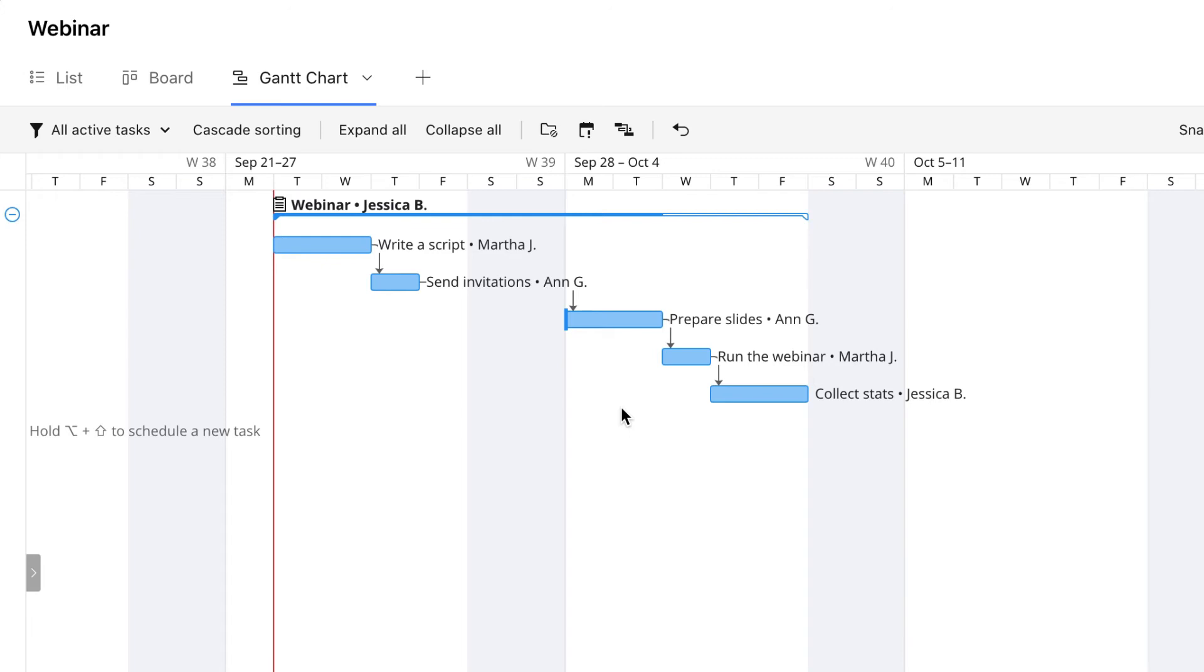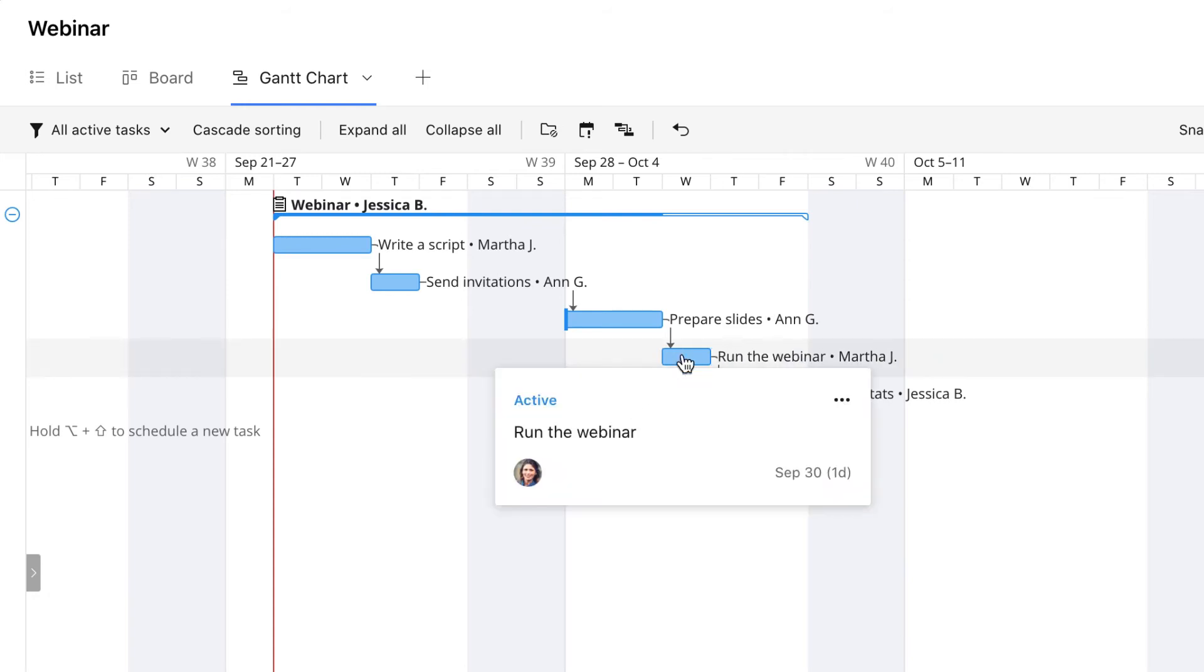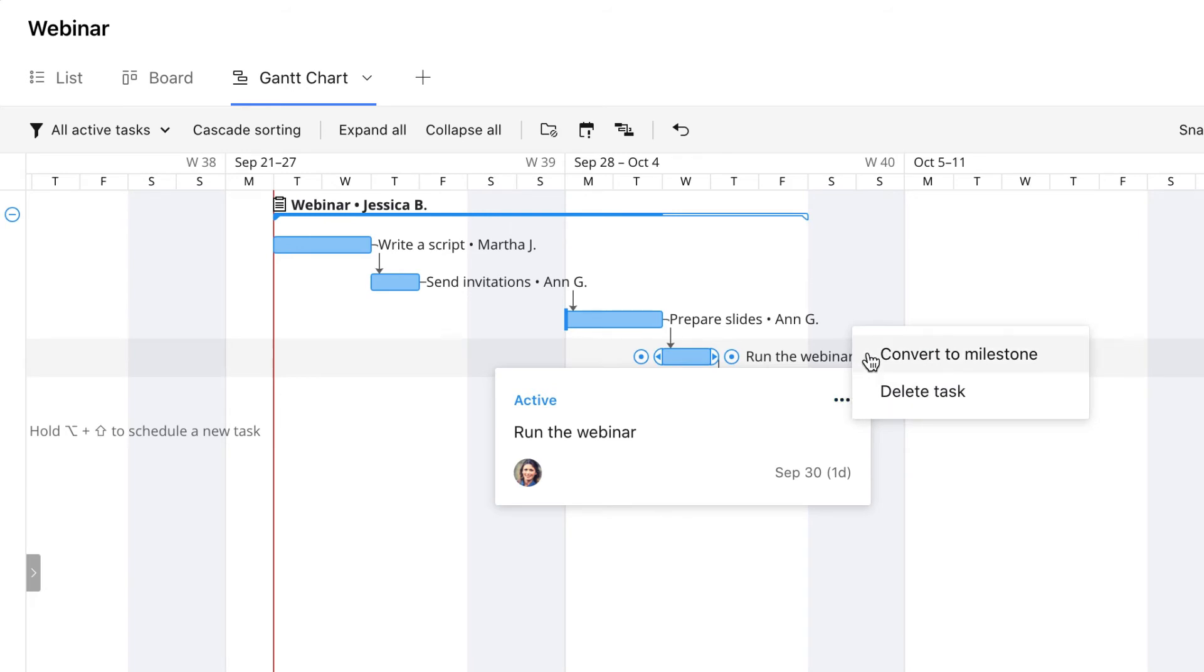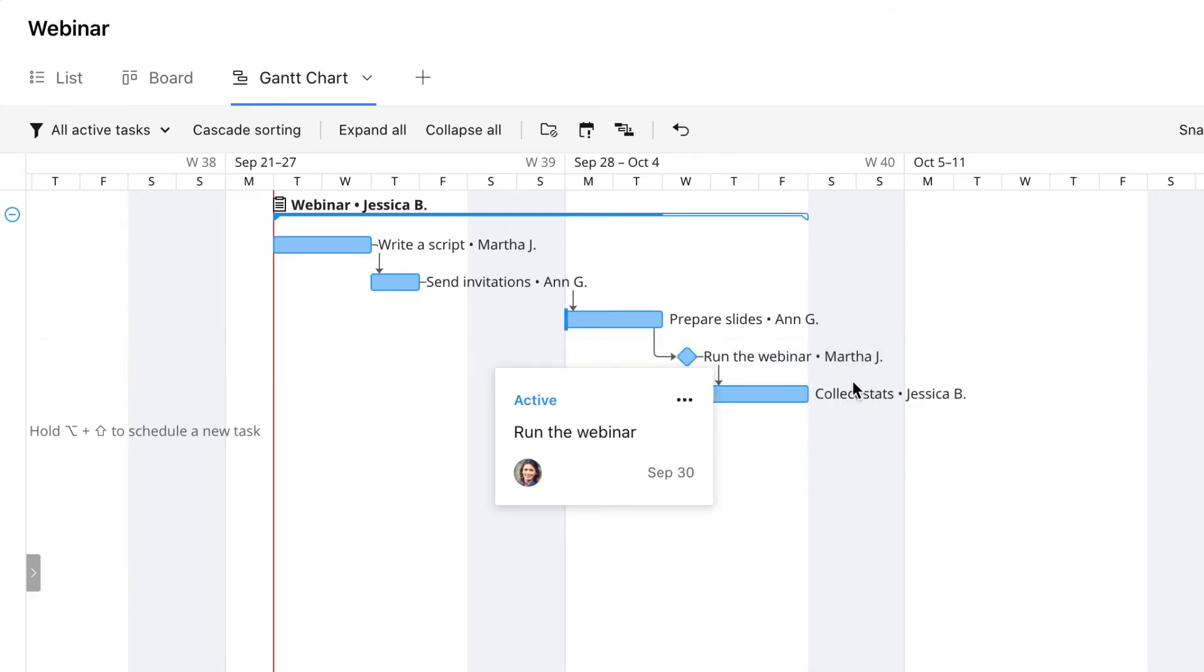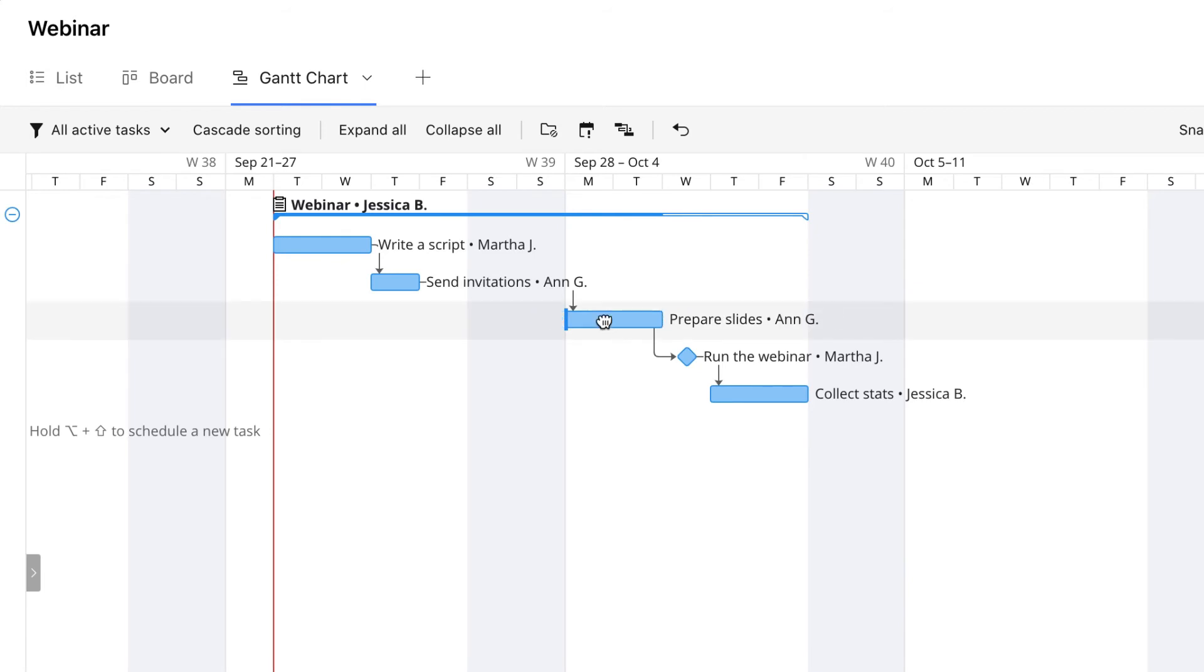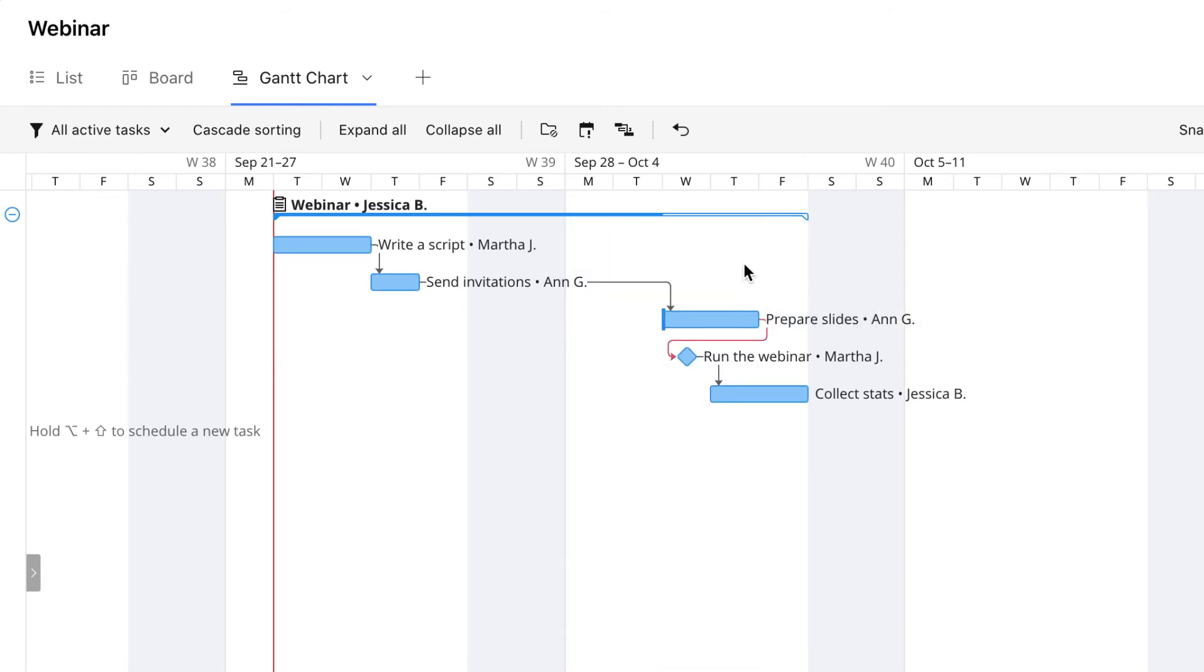The final step to launch the project is to convert the critical event into a milestone. That's the run the webinar task in our case. Milestones are one-day tasks that are tied to critical events like new feature launches, conferences, order submission, or contract sign dates. Even if we change the due dates of other tasks, the milestone won't be rescheduled.